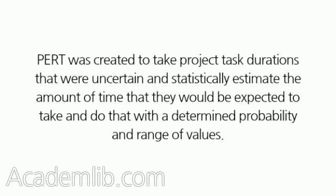PERT was created to take project task durations that were uncertain and statistically estimate the amount of time that they would be expected to take, and do that with a determined probability and range of values.